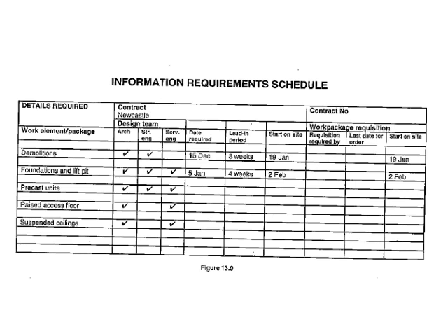Okay, information required. The next few slides are just an example of your basic request for information. So this is just a summary sheet which shows us which items were requested, from whom, requested on which date, what lead time, when you gave it out, the question, and when you actually received it. Okay, and when you want to start on site. So the date required: you require the information by the 15th and start on that date.